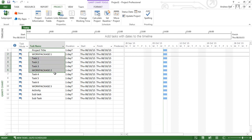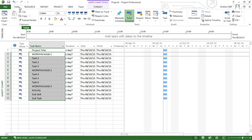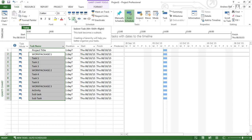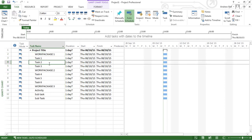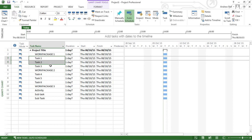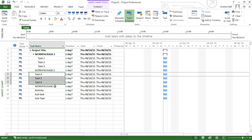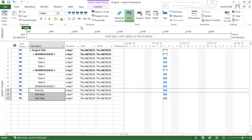I'm going to select everything underneath the project title and go to the task tab and use the indent icon to indent the tasks to become subtasks. This creates a hierarchy. This has pushed everything a little bit to the right, and we can see that the project title has now become a summary task. Now the benefit of using those caps locks on the work packages: I can select everything underneath work package one and indent them a second time. The same for the tasks under work package two and the last three tasks under work package three.